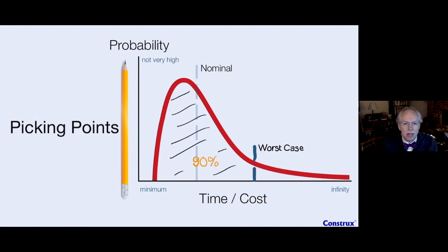So we're at 80, 90%, 85%, something like that, and 10% of whatever's left over is after the curve. This point is often called worst case, because you've got to think about all the things that often go wrong here, and all of those go wrong this time. What's the worst that can possibly happen? And 9 times out of 10, you'll always beat that number because it's the worst, right? And so that's a point on the curve that's pretty common.